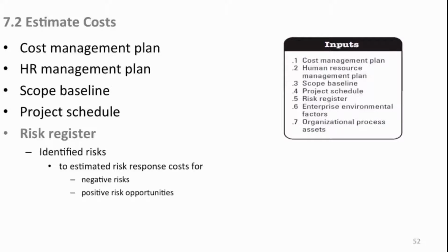Here we have your risk register. Of course, it's ever present. We always have to keep that on our mind, and components of the risk register apply quite a bit toward estimating costs, because we have our response plans in place for certain accepted risks, and should they occur, we're going to have to respond. Maybe the project goes on, but if we don't just stop and fix a problem, if that's what it takes, we're going to spend time and money to respond to a risk that has occurred in our environment to resolve it.